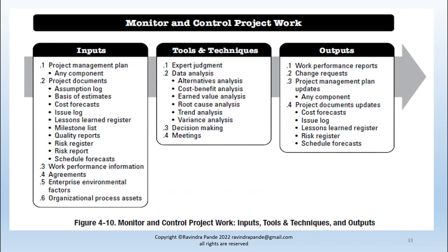They have a hybrid. So sometimes till actual project construction, they work on a fixed price, and then when the actual project construction starts, the development starts, they shift to time and material, because there are some places where you might need to leverage experts, you might need to leverage some external entity to make sure your task is performed with the optimum quality.